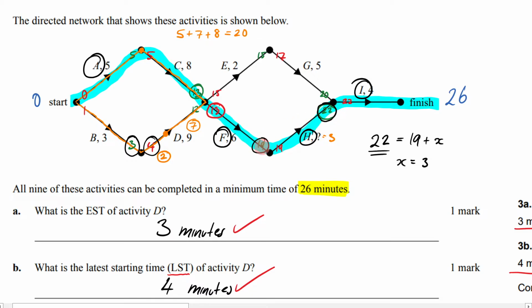So you'd go 20 plus 6, and then 6 plus 3, then 3 plus 4. 6 plus 4 is 10, 10 plus 20 is 30, 30 plus 3 is 33. So it's 33 minutes there. That is now your new earliest finish time, 33.